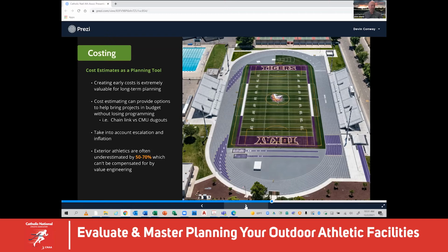And for example, the second bullet I think is really important to know is that we can give you options, as an example here, just dugouts. Are they chain link dugouts, open air, which most high schools wouldn't want to have? Do they have a fabric roof, maybe a metal shaded roof? Maybe they're a concrete block with a metal roof, cast in place concrete dugouts. Are they at grade? Are they sunken? All those items for a rectangle on a graphic plan, it could represent a cost that's $12,000. It could represent a cost that's $112,000 or somewhere in between.